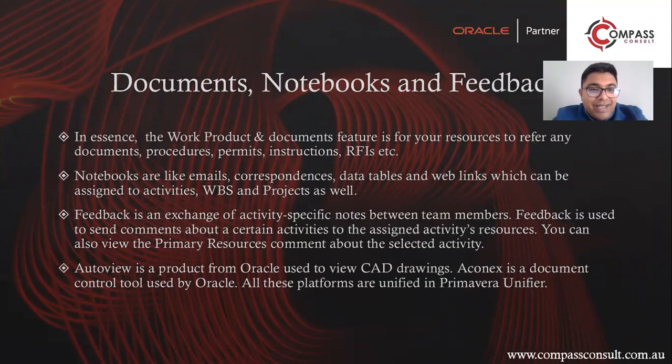Notebooks are like emails, correspondences, data tables, and web links, which can be assigned to activities, WBS, and projects as well. So basically, all your important notes, minutes of meetings, and correspondences from the client are uploaded in the form of notebooks.